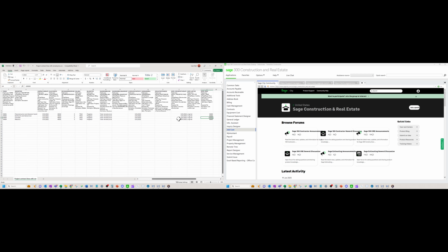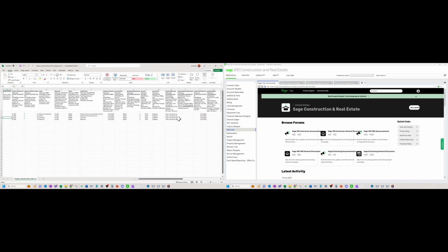This one is a simple schedule of values, 4 line items. It's a lump sum fixed price, with no guaranteed max price or anything. I'm going to show you how easy it is to import this. In your estimating system or in Excel, however you're doing your estimating, you can simply copy and paste your line items, or just sequence them here. You do your description of that line item, and this can all be preset.